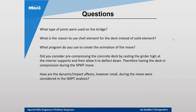Regarding dynamic impact effects during the SPMT move: yes, these were considered, even though unlikely. A situation where an SPMT wheel sinks in the dirt did actually occur during the first bridge move — they had to back up and place steel plates for the wheels to pass over. A dynamic impact factor of about 25% was applied for dynamic effects during the move.